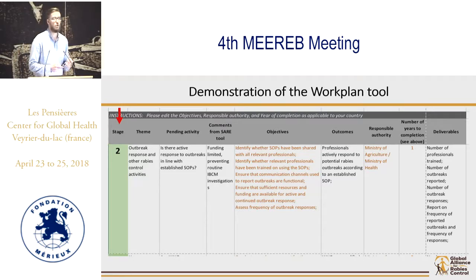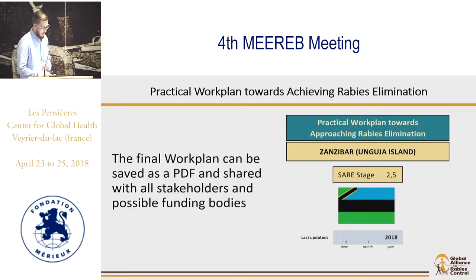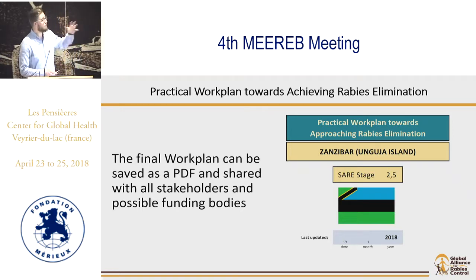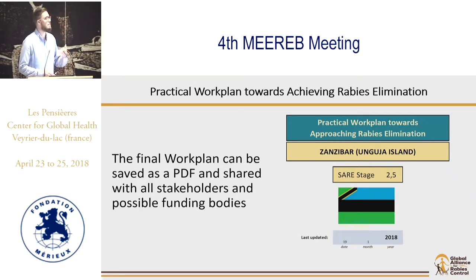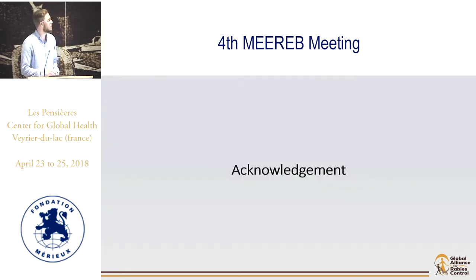Because you can customize it, these are KPIs defined by you — it is not a prescriptive tool and can be tailored to your exact needs. For every SAY activity that is pending, the system automatically generates objectives, a step-by-step process to achieve those activities, an outcome, a suggested list of responsible authorities, a suggested timeframe, and a clear list of deliverables and KPIs. There is a single button you can click that saves your entire work plan as a PDF that can be shared, distributed, and used to secure funding.